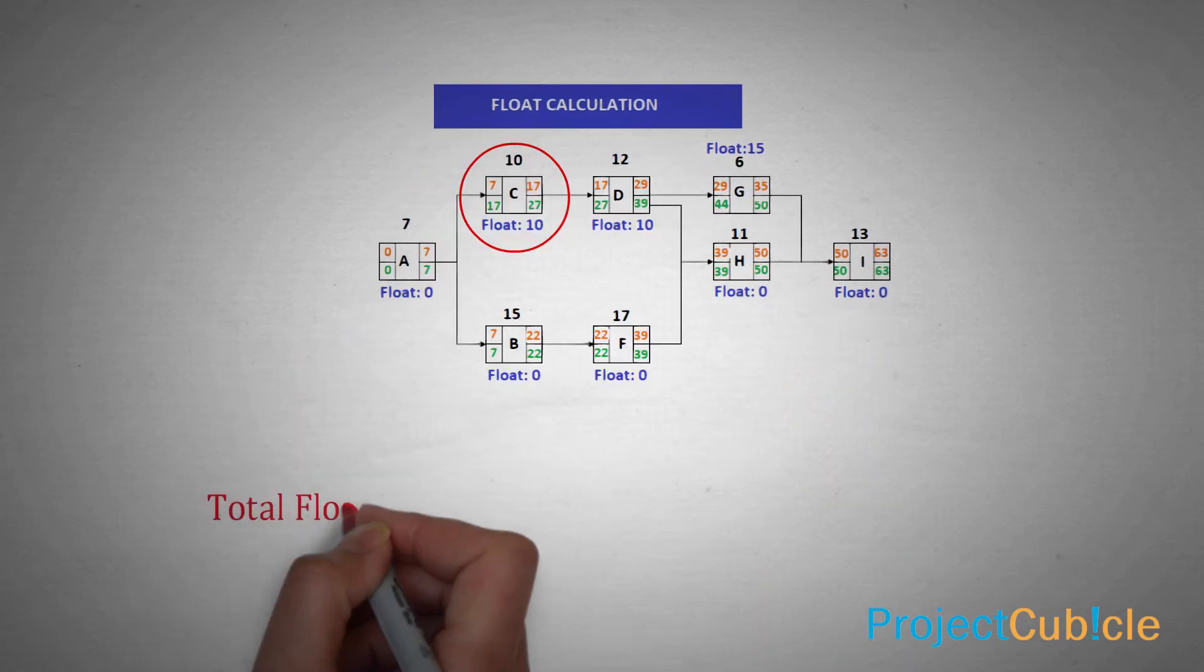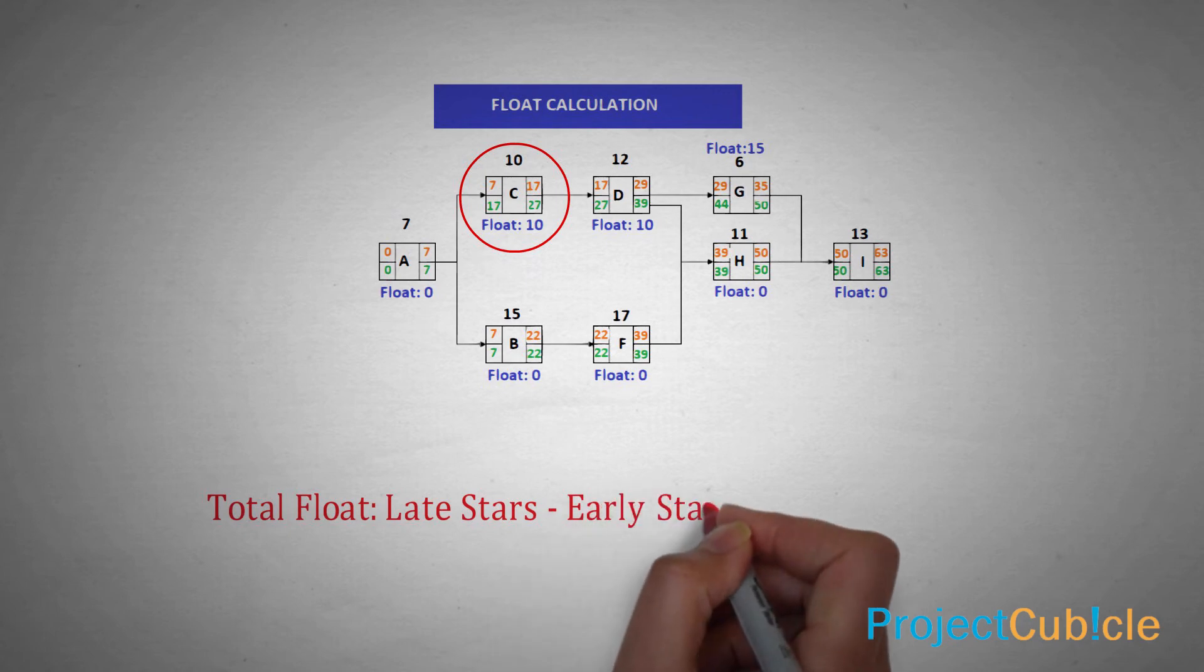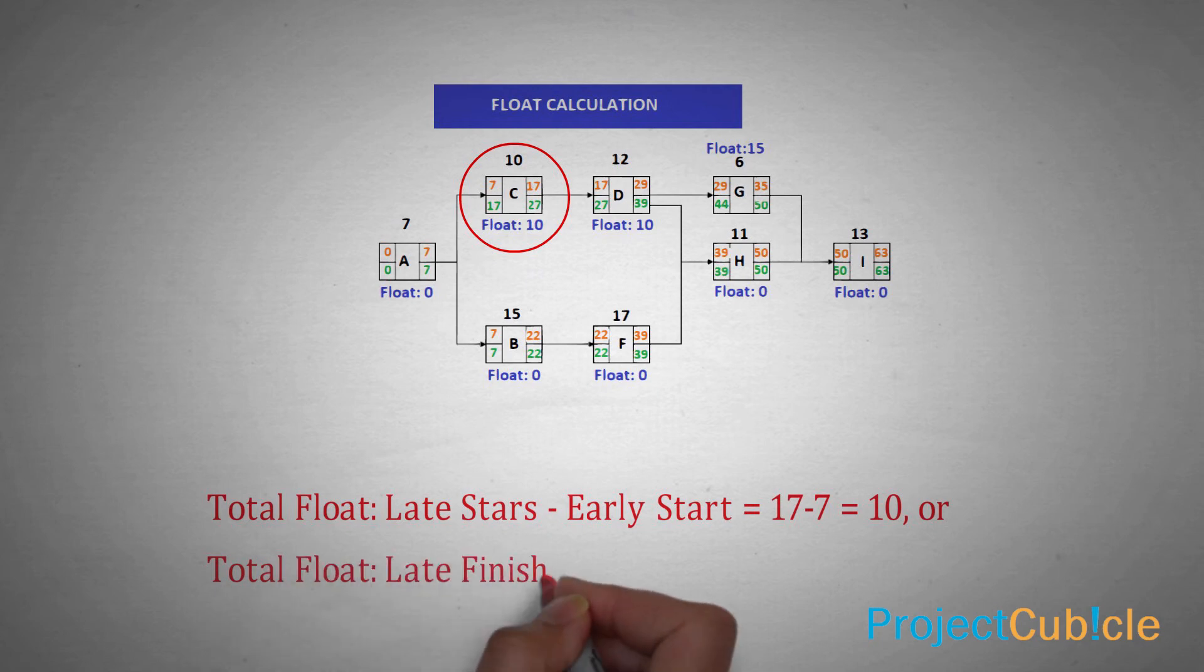For the activity C, total float. Late start minus early start equals 17 minus 7 equals 10. Or total float. Late finish minus early finish equals 27 minus 17 equals 10.